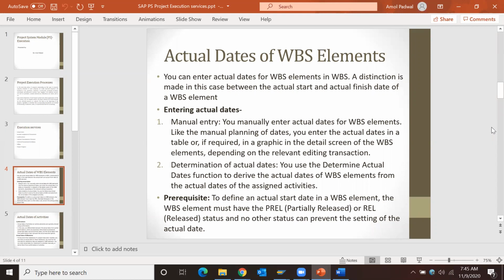Next, the operation which I'm going to execute using in-house resources has to be documented. So my resources utilized 5 hours for this operation. That 5 hours of cost and time should be recorded at project level so that I can track how much work I have completed and how much work is remaining. Got it?